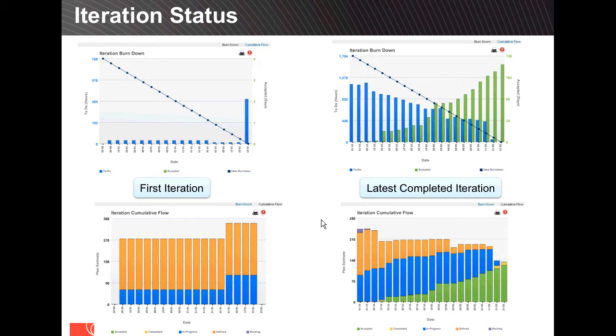Because this is based on story points, we often refer to scope, and as you correctly pointed out, in this scenario they actually took stories out of this iteration. I routinely do that, yeah. And it's one of the useful interpretations of this chart, because it will show you the changing scope as the iteration progresses. The bars get taller or shorter.